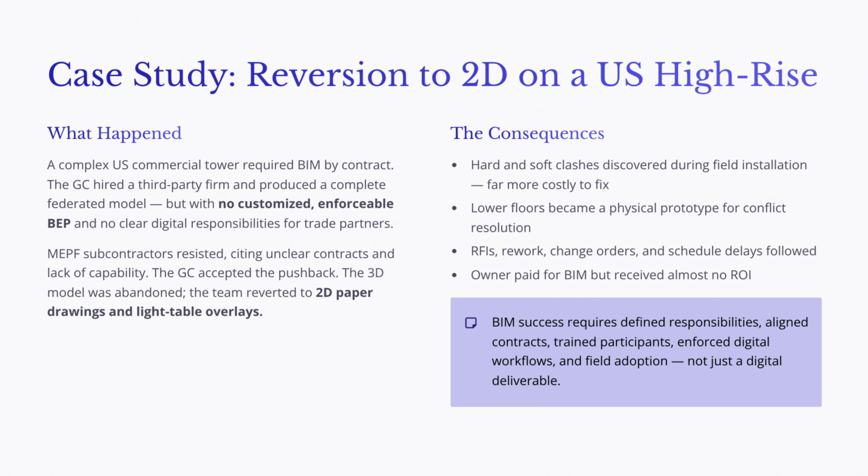The lesson from this case is clear. BIM success requires more than producing a digital model. It requires defined responsibilities, aligned contracts, trained participants, enforced digital workflows, and field adoption. Without those conditions, BIM can easily become an unused deliverable rather than a practical construction management tool.